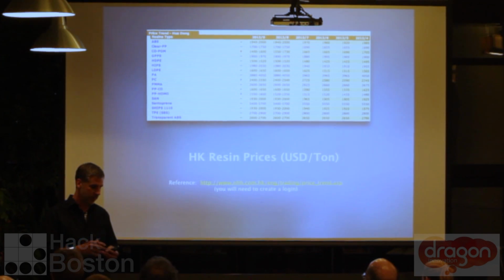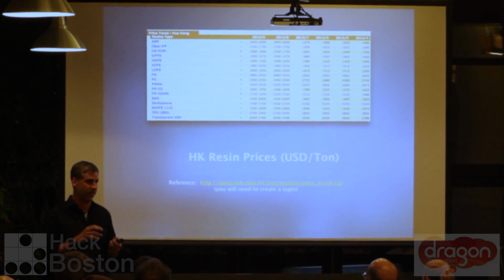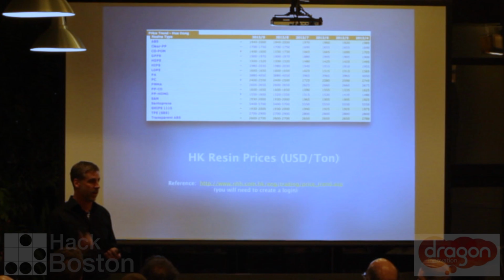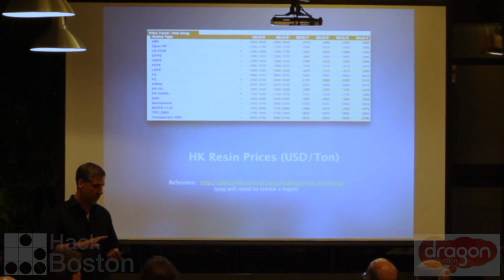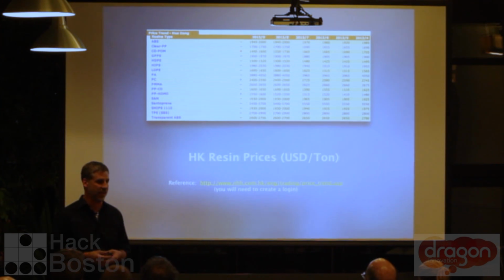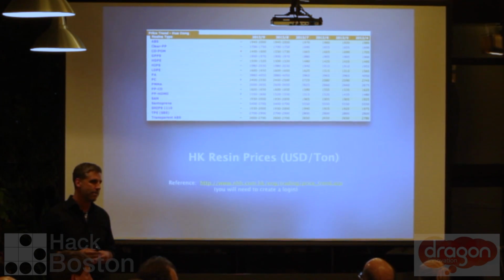And then it also depends on the number of features. So for the gear, it didn't matter from an injection plastic costing standpoint how many features I have. But from a tooling standpoint, it absolutely does, because you've got to create the EDM or plunge electrodes and bang it out, so that will definitely drive your cost up. Then the grade of the tool: if you're doing an optical lens, you want a really fine grain tool steel, whereas if you're just doing some internal housing, you don't really care. And then the polish. Is it a mirror spark polish, because that takes longer, or have you put some texture on it? And if you have any ballpark figures, let's say?